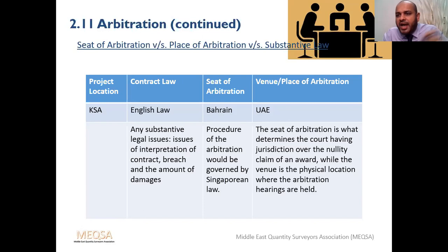But your contract is under English law, which means offer, acceptance and everything will be looked at only under English law. For the arbitration: how many arbitrators? How often will they meet? When will evidence be given? How will communication take place? Is email accepted or not? Should each party communicate with letters? Those procedures will be followed by Bahrain's GCC rules.